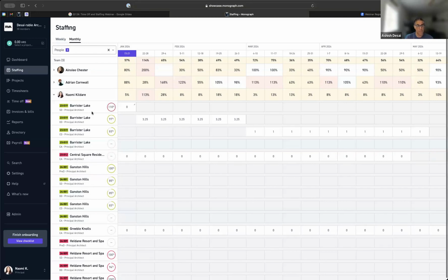But for those that are planned, you can see these percentages. And so what this is telling us is effectively how many logged hours have happened already in previous weeks, how many are planned for the future, i.e. staffed, and then how is that comparing to your planned hours? So this is basically saying, okay, cool, within a very small margin, half an hour, I am on track.